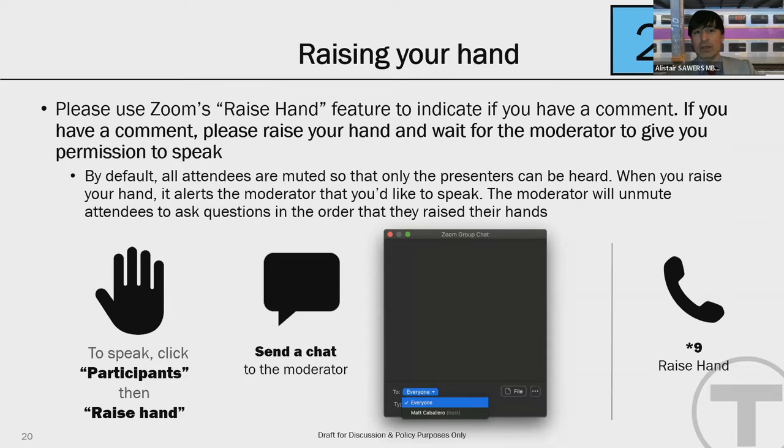The one thing I would caution is it's not a quick process, but one of the things we're trying to do is look at alternative technologies to reduce the need to build out overhead catenary, which takes a very long time and the environmental process is long. Use of battery actually could accelerate our ability to deliver this system, because on existing estimates, it would take us a long period, in excess of 15 years, to do that around the entire 400 miles. So that's part of the reason why we're taking our time studying it, to find cost-effective and quicker ways of doing it.